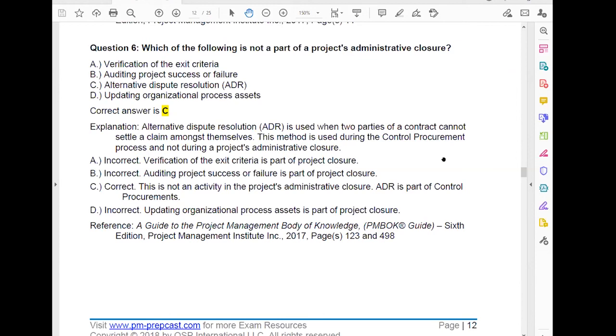I want to add on this one. For the question of Sir Argel, it's not necessarily the government right away, sir. We have an appointed person to be the mediator, like a third party. For example, if I'm qualified, I can go to BCA to have myself accredited as a mediator for such cases. Even though I'm not a lawyer but a practicing engineer, I can be an accredited mediator. That's one example.